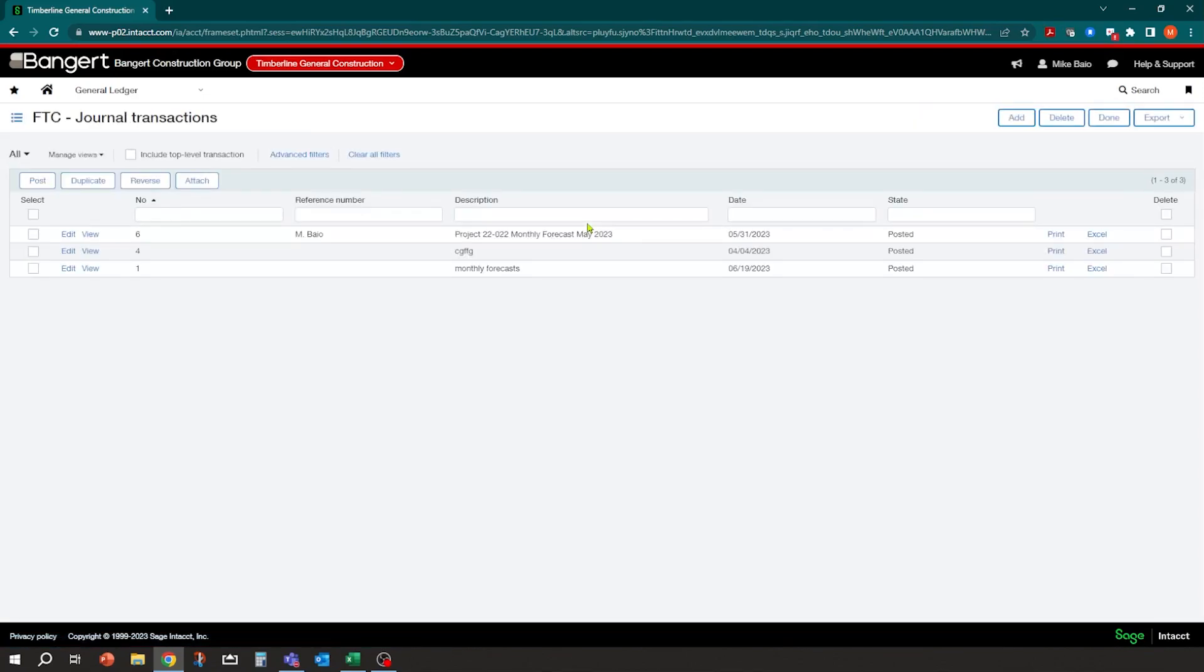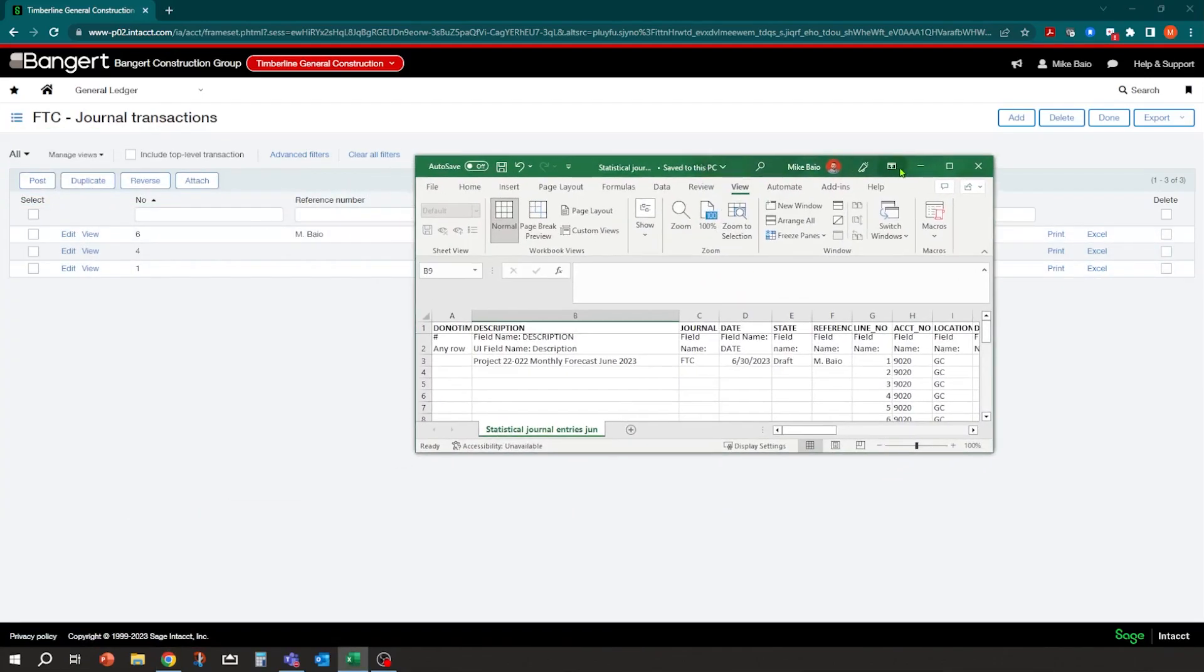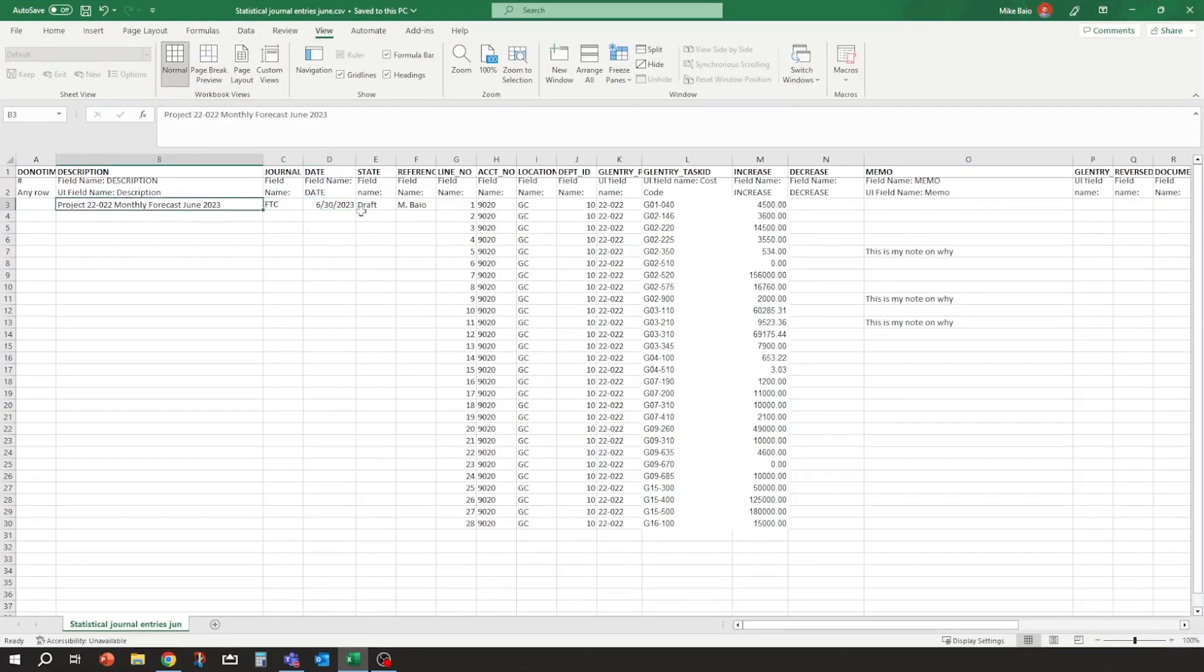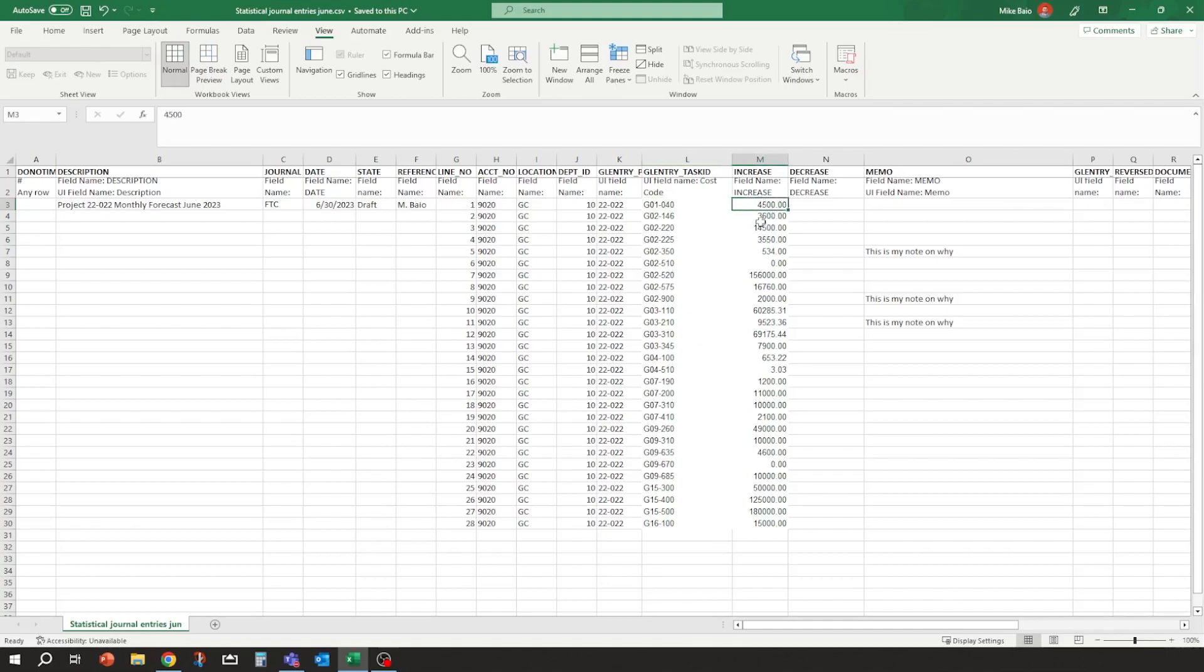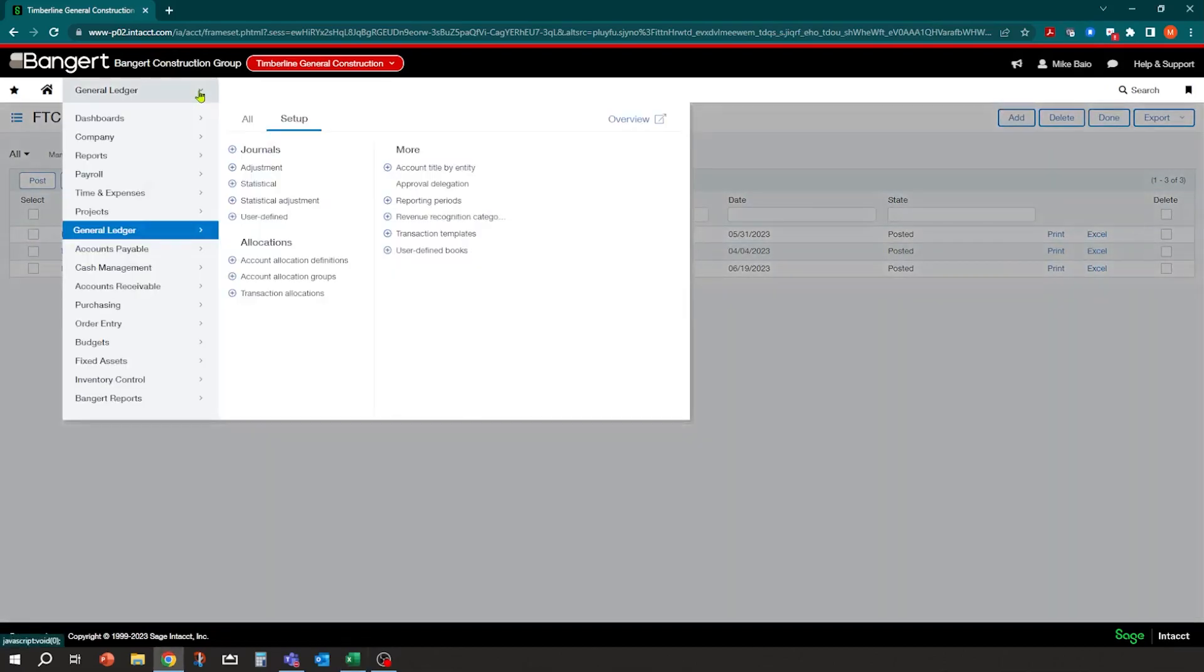I'm going to cancel out of here because I'm going to actually show you how we can import those transactions. So instead of entering them in manually, you can also import them. It's just a standard template. I have one over here that we'll use for today, basically my 630 projections for this project, 22022. So you can see here for each of my cost codes, I can put my projections in here. I can get them from another spreadsheet and copy it over. I can format it to pre-populate, whatever you guys want to do.